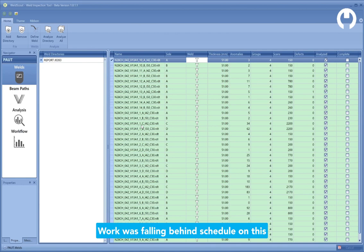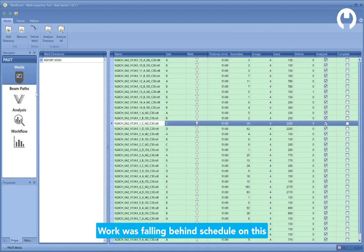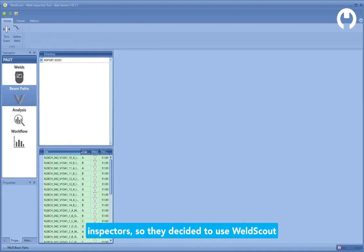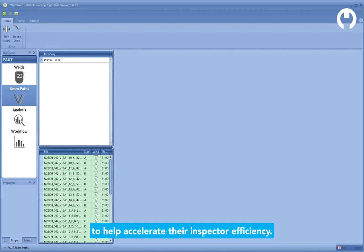Work was falling behind schedule on this project because of a shortage of qualified inspectors, so they decided to use WeldScout to help accelerate their inspector efficiency.